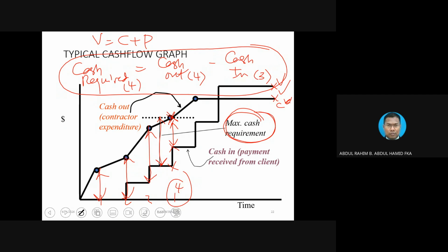If, for instance, you want to know the payment for the work on May, and that amount will be paid on June, you take a look at the payment received on the month of June, but the work was done on May, because the process is going to be evaluated like 1 month, isn't it?